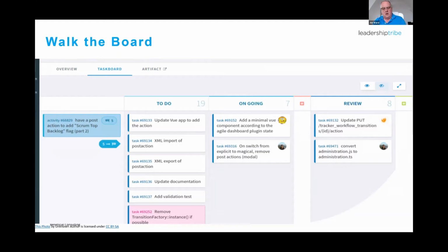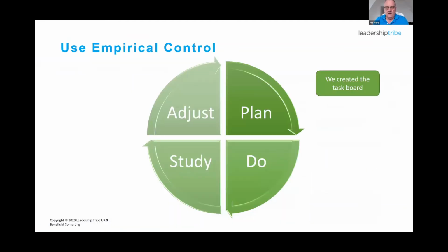We color code each one of these tasks so that we can say which OKR this particular task relates to, so that we can get a good picture of whether we are progressing all the 4 OKRs at the same time, or are we missing one, and we can start to see the overall progress of the whole thing.